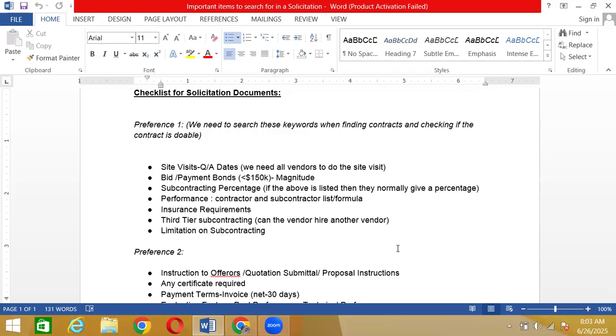Now the vendor did not go to the site initially when he gave us a quote. But once you have been awarded, you have to go there to look at everything, to purchase the supplies, make the schedules, all that. So when he went there again to take a look at the table for the final schedules and everything, he was like, this table cannot be repaired at all.